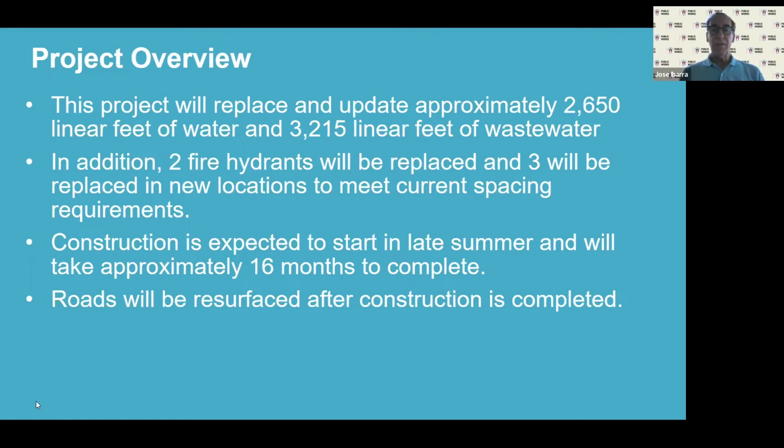The construction is expected to start in late summer, but that will be dependent on the contractor getting all the needed supplies in order to have a continuous construction phase, and will take approximately 16 months to complete. As a note, all the roads will be resurfaced after construction is complete.